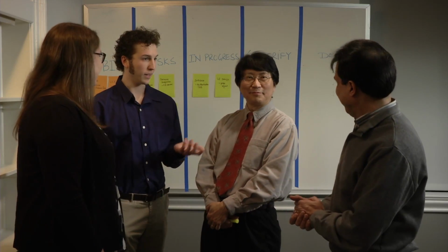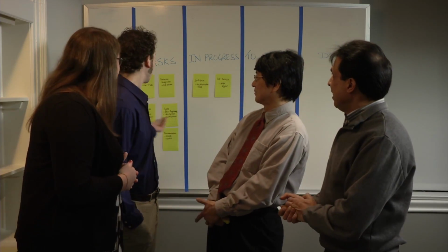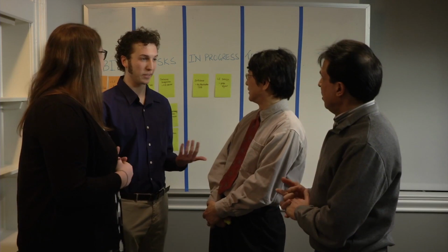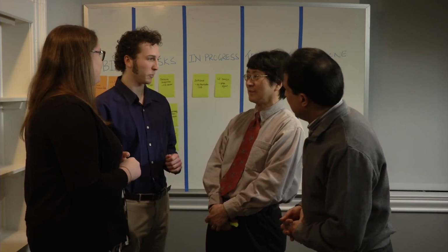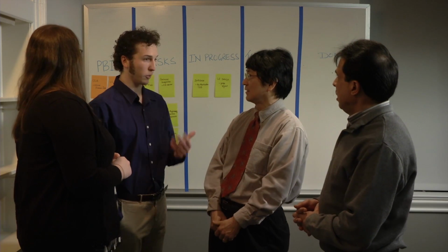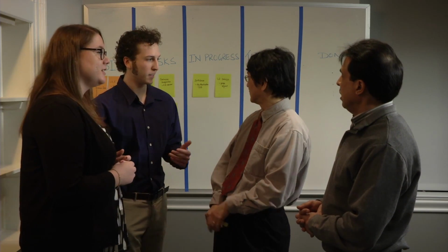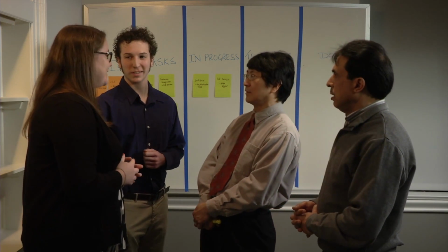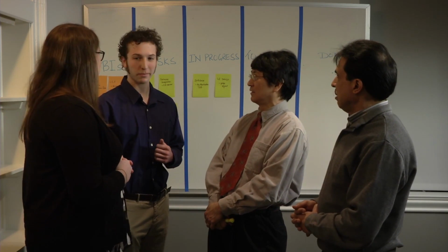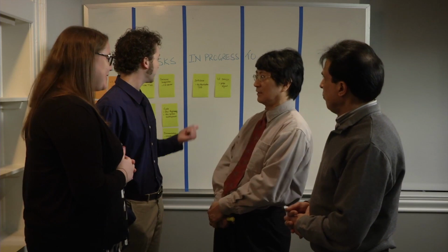This scene illustrates the daily Scrum. This meeting is facilitated by the Scrum Master and is time-boxed, usually to 15 minutes. Sprint team members meet in a room without chairs and tables and take turns in answering 3 questions. 1. What did you do yesterday? 2. What will you do today? 3. What are your impediments?